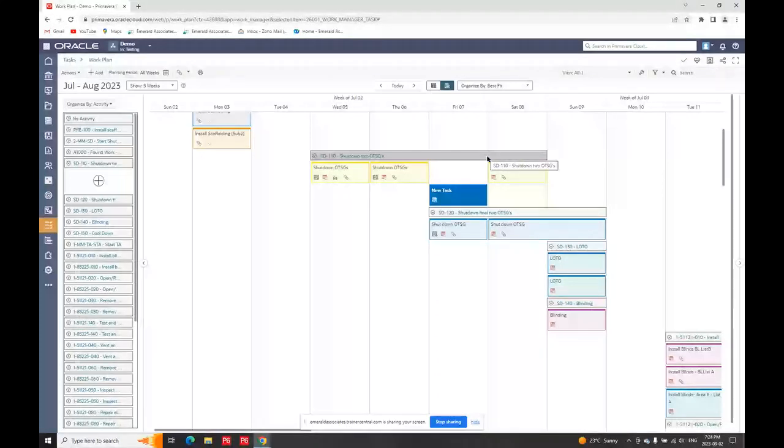Now you'll notice that on the activity, because this activity is now past what the original end date of the activity in the schedule is, you can see I've got dashed lines here. So it will allow people doing updates to move it out, but it shows them graphically, okay, you're missing the end date of what this activity was supposed to be.